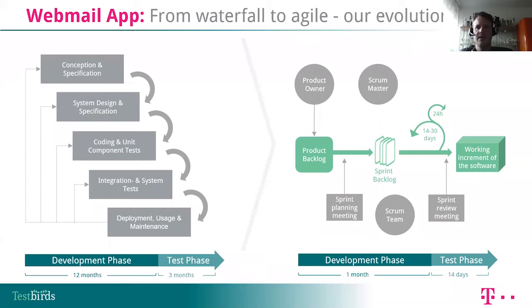But after a while, the piece of software became so huge and complex. So after each sprint, we had to put an extra test phase for regression testing. And so we had, after each sprint, a 2-week extra sprint for regression testing to put in the reports again within the next sprint. And it took a whole lot of time again.